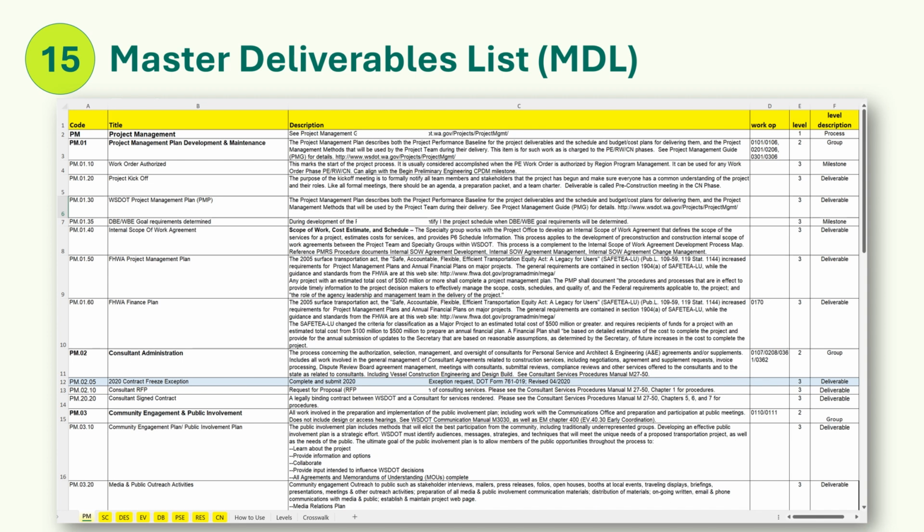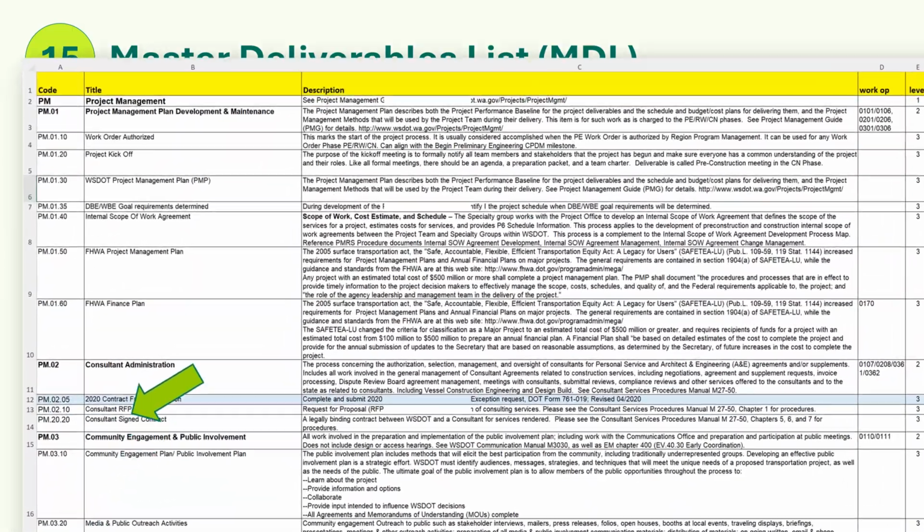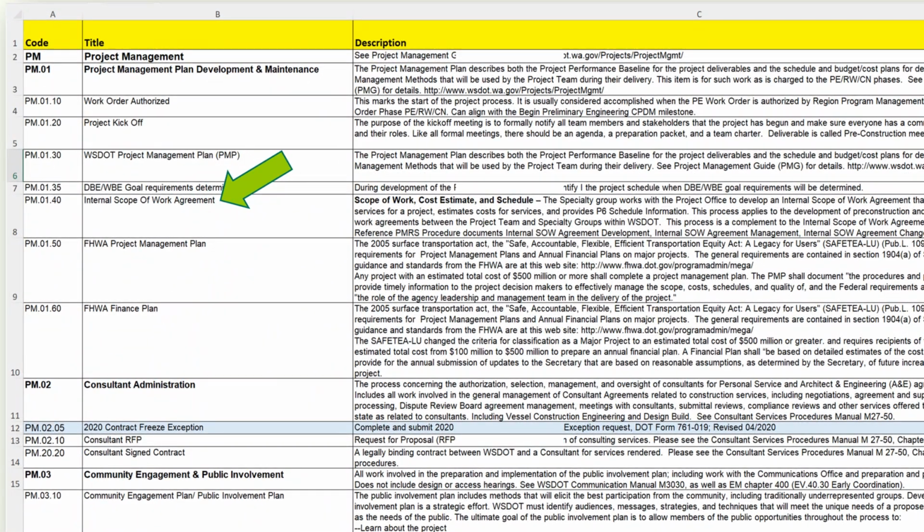Determine which MDL items will likely be included in your project. Later, you can further refine this list. See the How to Use tab. Carefully review the groups, i.e., the yellow tabs. The ones you select comprise the initial work breakdown structure for your project. For each group, review the deliverables. These are the third-level items needed for your project.